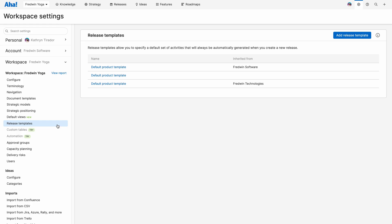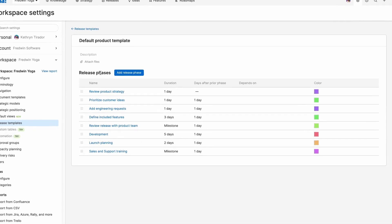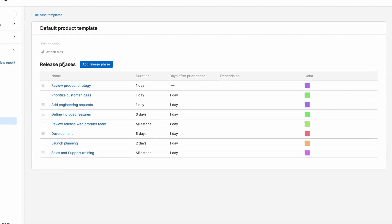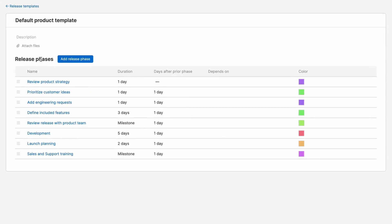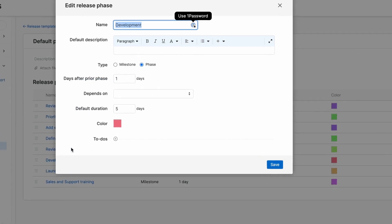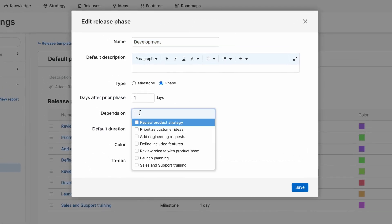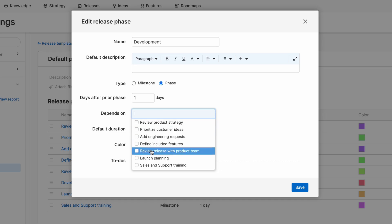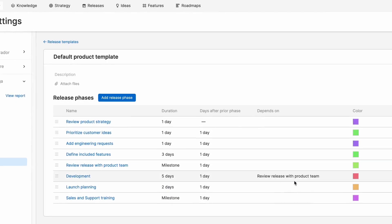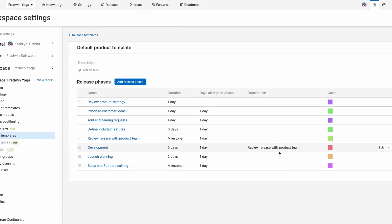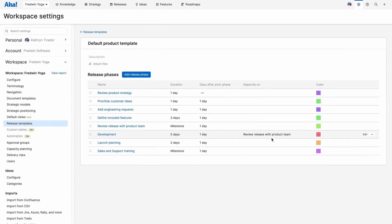Let's take release templates as an example. The default template gives you a great starting point of important phases and milestones for release. You can edit, add your own, and even add dependencies in between them. This will be visualized on your Gantt chart and help make sure that no important phase or milestone is missed as you prepare for a launch.